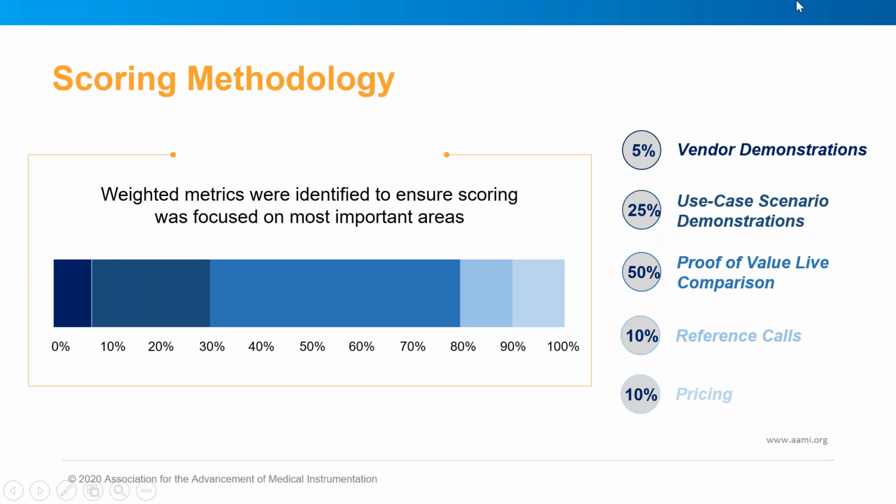All right, and I won't spend a lot of time on this slide, but I did mention that everything needed a score, and we defined metrics, and so it was important to score throughout the progress of the project, especially when you've got a project that lasts several months. You're going to forget what happened on demo day, and maybe forget what happened in the first couple instances of side-by-side comparison. So it was critical for us to make sure that, one, we tracked all the scores, but two, that we had a methodology that gave importance to what we thought were the more critical aspects of the technology.